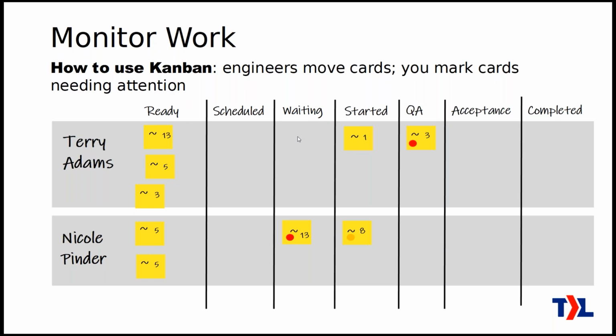Or it could be that the next stage of the work is something that just needs to be done on a schedule. It's a network outage. We're going to be on site. We told the customer that we're going to be there on Thursday at 8 in the evening. And so there's really not any more work to do on that ticket until Thursday at 8 in the evening. You don't want that clogging up any of these other columns. You don't want that back in the ready column because you've already done the most important work on that. So that usually calls for its own column for scheduled stuff, where there's nothing to be done on that ticket until we get to that time in the calendar when the work is going to resume.